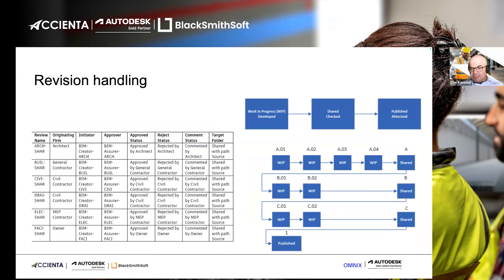For revision handling, work starts in WIP with mini-versions such as A01, A02, A03, A04. Once ready for approval, it goes through a workflow and becomes Revision A. If not accepted, it goes back to WIP. The next version becomes Revision B, with its own sub-versions. Once all revisions are approved and ready for construction, the numbering can change to 1, 2, etc. All these requirements can be handled within the ACC system.